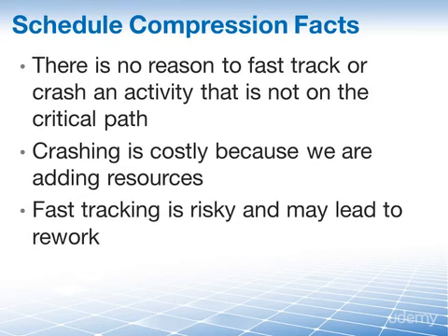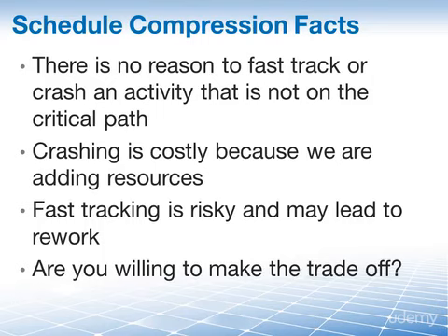Let's assume that we fast track the production of the prototype and then the designers change the basic design. That will lead to rework because we'll have to redo the prototype again, and we may lose even more time. In the end, you must decide if you are willing to make the trade-off between having this increased risk or cost and being able to implement a shorter project schedule.